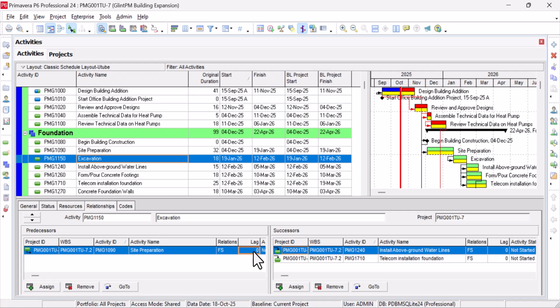So, but if there is no rule, you can use it minimally, maybe between -5 and +5, or in the worst case, between -10 and +10 lag or lead, right? But in the real sense, your schedule should show what is practicable with the project.